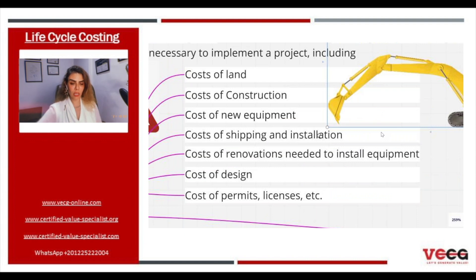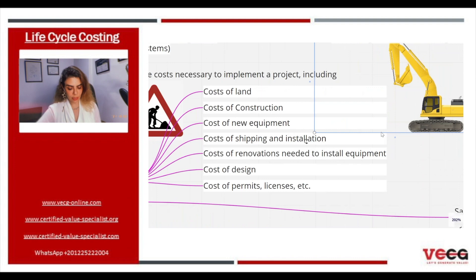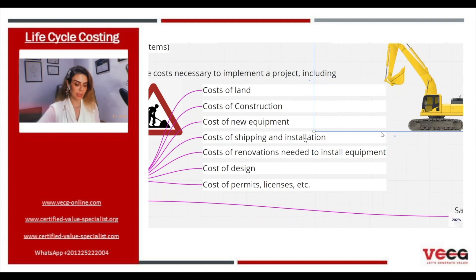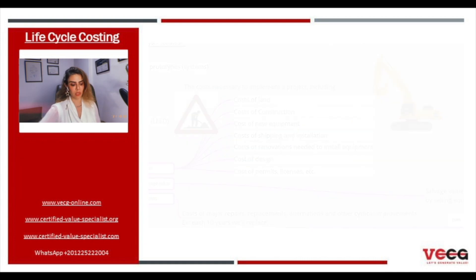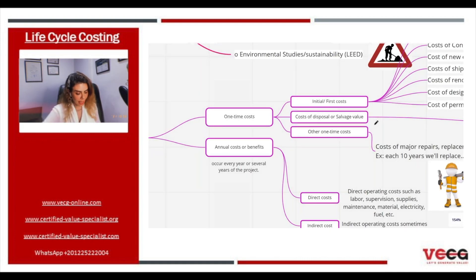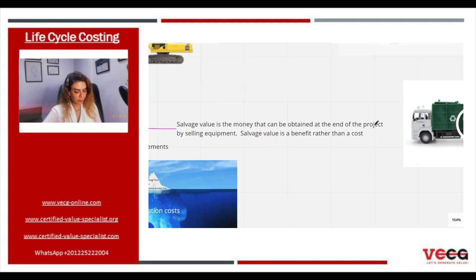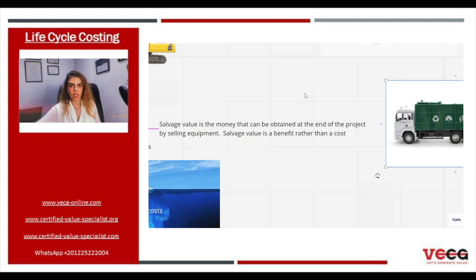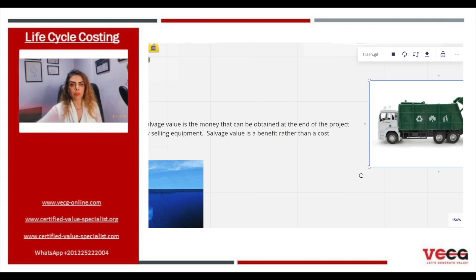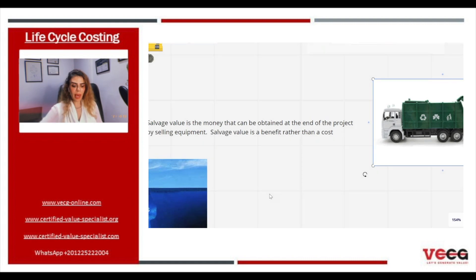Initial cost includes the cost of land, construction, new equipment, shipping and installation, renovation needed to install equipment, design, permits, licenses and so on. The second type of one-time cost is the cost of disposal or salvage value. Salvage value is the money that can be obtained at the end of the project by selling equipment, so salvage value is a benefit rather than a cost. At the end of the life cycle, you may need to pay for disposal or gain money from selling equipment.